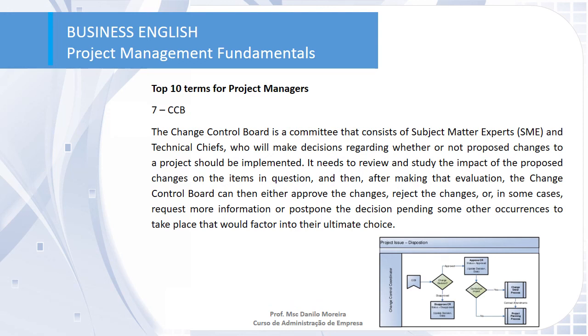The Change Control Board, or CCB, is a tool that we use when we have to analyze any changes of a project. Okay? So we are going to create a committee, a group of people, composed by experts and obviously the sponsors of the project, in order to decide on how to propose changes for a project that is not on hold, but it is moving, and we need to implement some changes. Okay, so to do this, we use this chart here. As you can see, it's a simple flow in order to decide if a change is necessary or not.